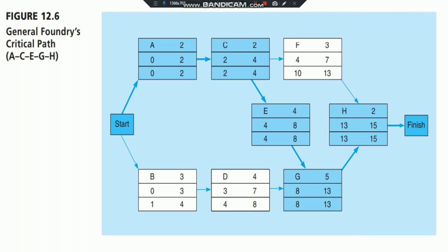However, Harky knows that if the project is not completed in 16 weeks, General Foundry will be forced to close by the environmental controller, since it did not meet the deadline. Also, Harky is aware that there is significant variation in the time estimates for several activities. Variation in activities that are on the critical path can affect the overall project completion. Possibly, it can delay it. This is one occurrence that worries Harky considerably.